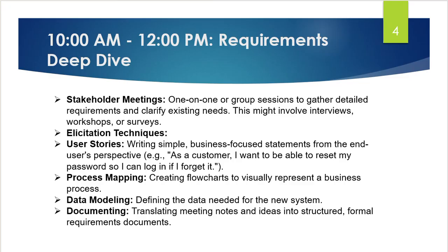And also elicitation techniques like forming the user stories, drawing the process mapping, data modeling, and documenting all these things. In a user story, I write a simple, business-focused statement from the end user's perspective, who is actually using it. It is in the form of: as a customer, I want to be able to reset my password so I can log in if I forgot the password. Like that I will create the user story, or as an admin user I can give rights to another role, so I can assign the role.